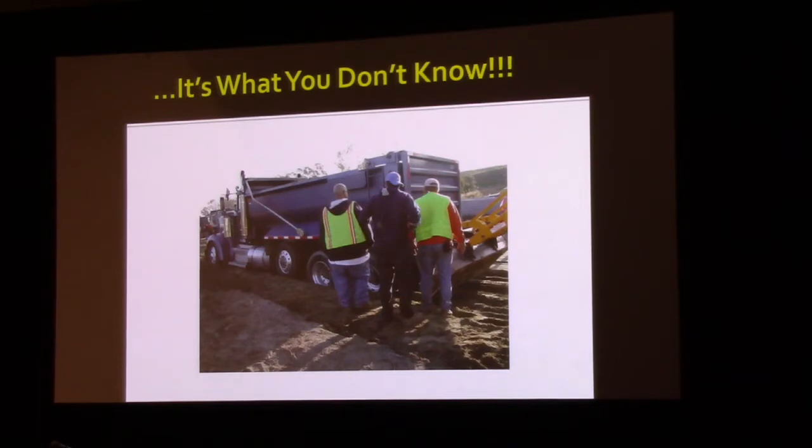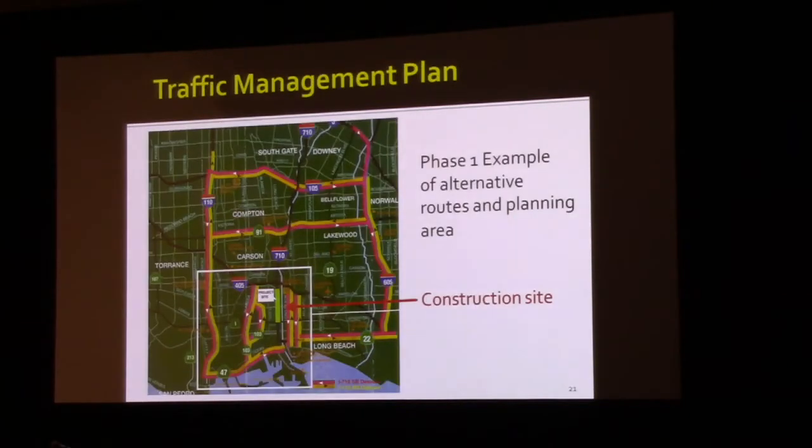While they didn't get their productivity up for that first 55-hour closure, they learned a lot in regards to how to address this in their future closures. So it's making sure that you have a contingency plan, whether it's traffic, material production, or construction activities. You might have accidents and all of these things. You have to be ready for those, and how are you going to deal with this? It took them a few hours to figure this out, and then they got up and running fairly quickly, about 3 or 4 hours before they found the solution.